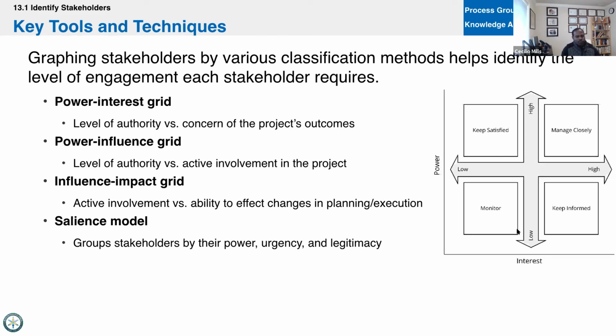The folks who don't have much power, but they're very interested in the project and want to know any and everything, well, we got to keep them informed. And so that's what we do there. And then those folks who don't have much power and don't have much interest, we monitor them, right? We don't do nothing. Remember from PMI, we'll never just do nothing. We'll put them on a watch list. We'll just monitor what their activities are.